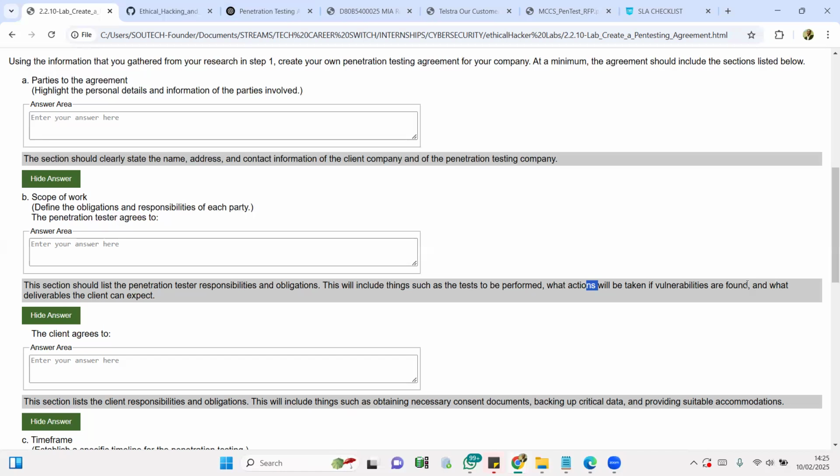That is a security audit, a vulnerability assessment, a pen testing. That's just one thing. Now, that is different from do a security audit, do a vulnerability assessment, do a pen testing, and also fix whatever issues that you find out. Now, that's a different ball game altogether. So imagine the time it is going to take, the finance it is going to take, the team it is going to take, is going to be way different.